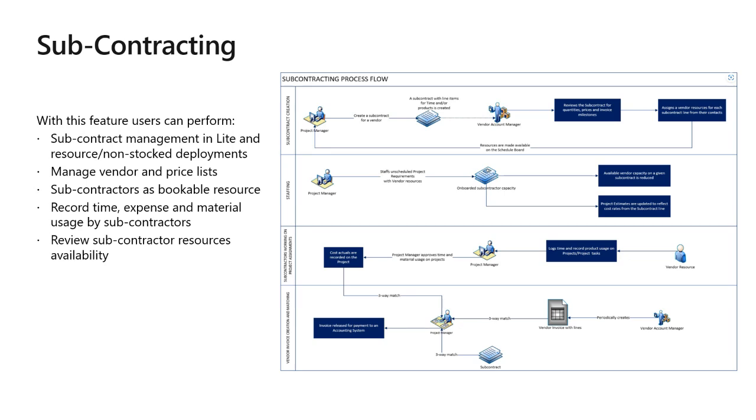Of course, an important part of this, as I just noted, was around the contractual arrangements. So there's now also the concept of being able to create subcontracts for these vendors and subcontract lines within that, which define which projects a subcontractor is working on and in which possible roles and at which price. And then, of course, now that you've defined a price on those subcontract lines, you would want those prices to be used on your cost actuals as you deliver the project.